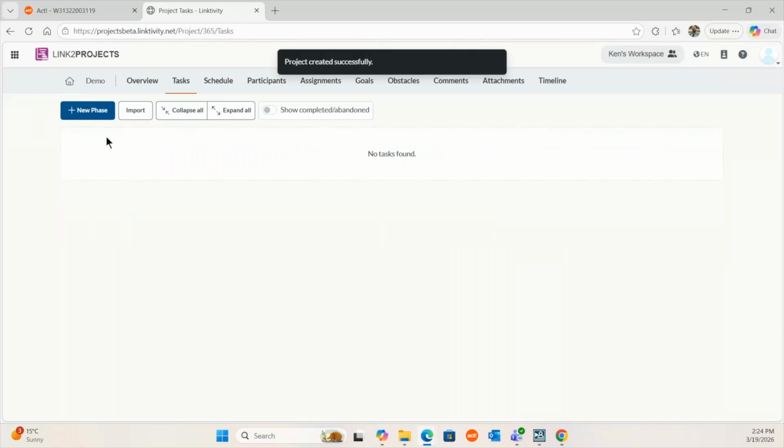okay. So the reason I wanted to do this again is I'm going to show you what can really save you a lot of time. Now, some people are going to have every single project be bespoke, starting from scratch, but many of the projects in our world are similar to past projects, and it can save a lot of time to borrow from other projects through the import feature, which you can see here. And this is only available if you go through the from scratch option. Otherwise, you're going through the wizard and you'll likely end up having to delete stuff or overwrite stuff.